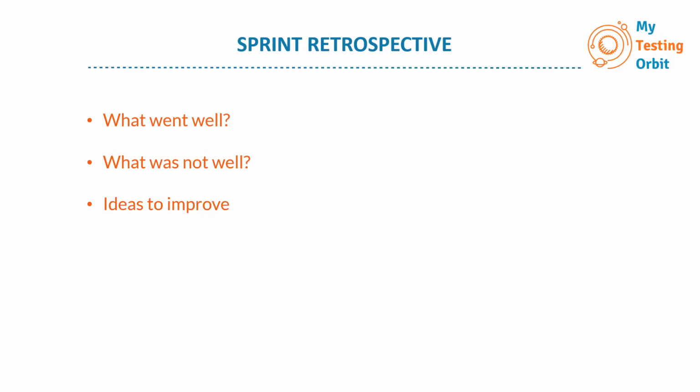So now, how the retrospective is done. The key idea of retrospective is getting details from all the Scrum team members, but whatever suggestions, good or bad, are given, these are kept anonymous. So there are two ways. One way is that the Scrum Master, because the Scrum Master is basically hosting this meeting as well, can give 3 post-it notes to each member of the team: one for what went well, one for what did not go well, and one for ideas to improve.